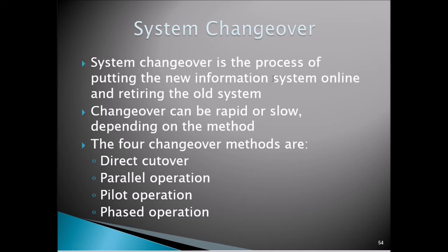into both systems. There's the pilot operation, which is usually the least expensive. It's where you do a little pilot test launch. And then there's phased operation, where you slowly take different modules or different pieces of the old application and integrate it and cut it over into the new application. I think the direct cutover way is the safest way to go. It's also the most, well, I was going to say it's the safest, but it's also the most risky.